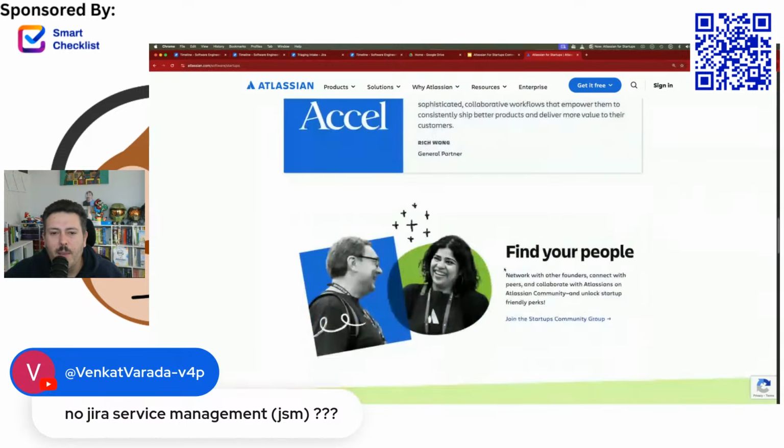When you look at an initiative versus an epic versus a story, the way I start to decompose things is that my initiatives involve multiple teams. So I'm going to have a UX team, an Android team, an iOS team, a backend team, a web team. Multiple teams, multiple months, maybe a quarter, maybe two quarters, but ultimately at the initiative level, this is the product. This is the thing we're going to ship. This is the whole product itself, or maybe the project.